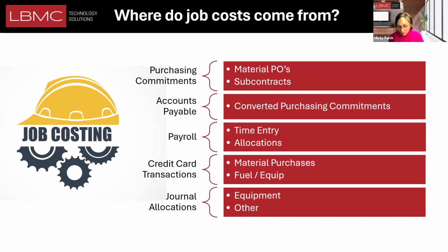For example, the advantage of using purchasing commitments is twofold. If you have inventory, you're probably already using purchase orders. But the other advantage to using purchasing commitments like subcontracts is for prediction of cost to complete. So that is a very important activity that happens with construction companies. And it happens for many reasons.